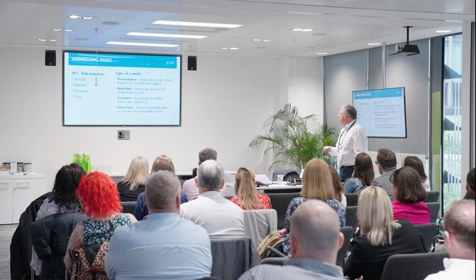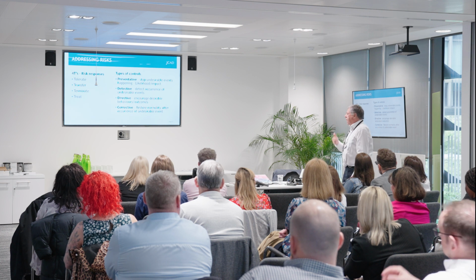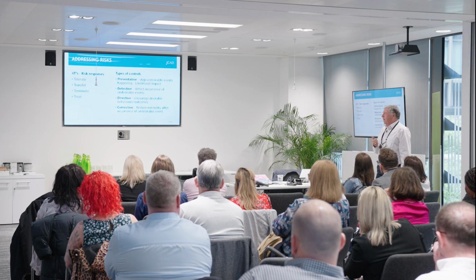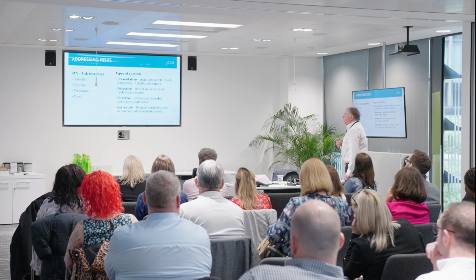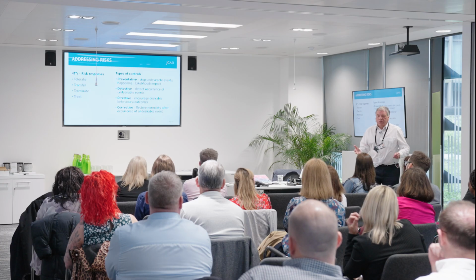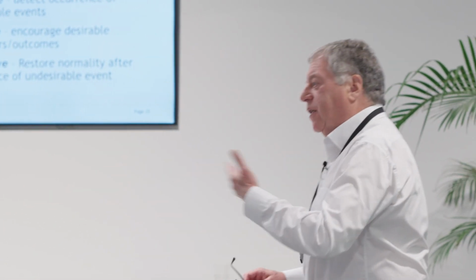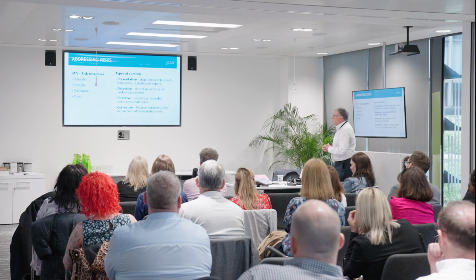I mention it because what we're trying to do through the bow tie is to mitigate the risk as far as we can. So if we think about the types of controls we have, and if we don't have any, for example, preventative controls, then maybe we need to start to think about, well, what can reduce the risk. The key thing in risk registers, are the actions doing anything? Attending the meeting, so what? Attending the meeting to establish something that has an impact upon the likelihood is what you need to know.